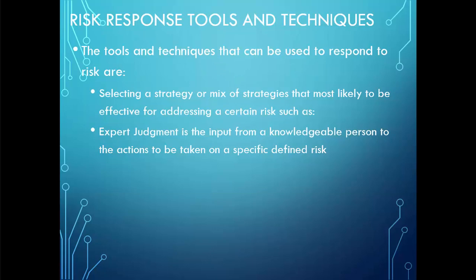The tools and techniques that can be used to respond to risk are selecting a strategy or a mix of strategies that are most likely to be effective for addressing certain risks, such as strategies for negative risks or threats such as avoid, accept, mitigate, transfer, strategies for positive risks or opportunities such as exploit, share, enhance, accept, and contingent response strategies.